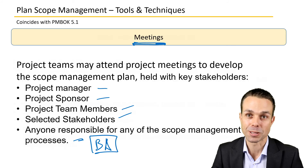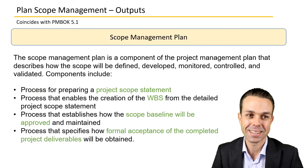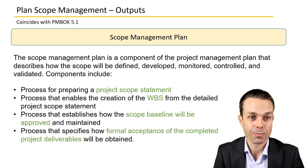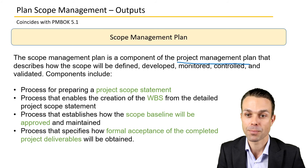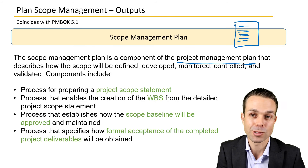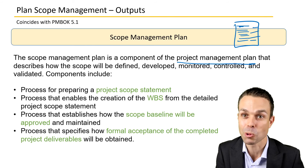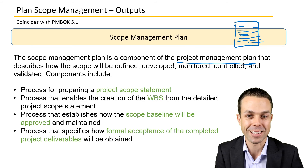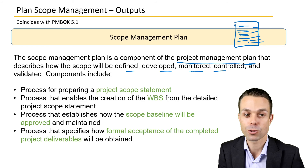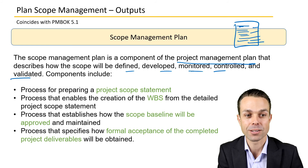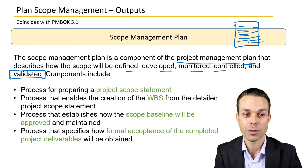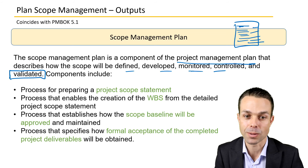There are two outputs from Planning Scope Management. The first is the scope management plan, which is a component of the project management plan — it sits alongside other pieces like risk, cost, schedule, quality, and procurement. It describes how the scope will be defined, developed, monitored, controlled, and validated to ensure the customer got what they wanted.